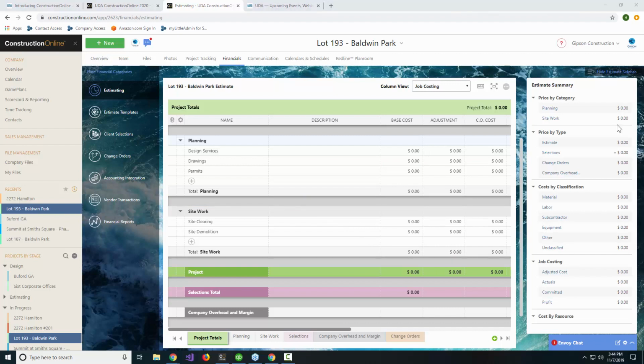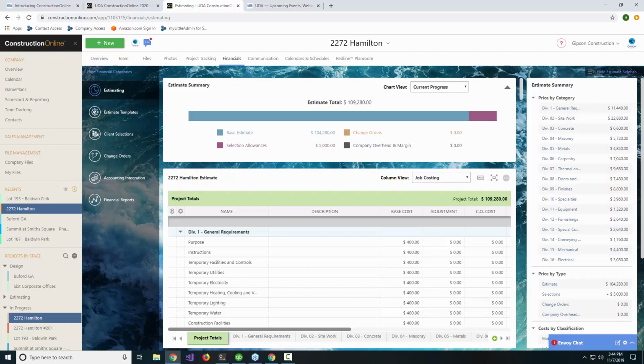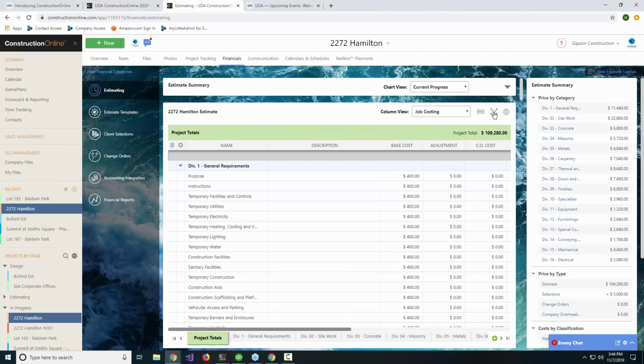And really that culminated in adding functionality for different tabs or sheets into the estimate itself. So those of you who are familiar with using our 2-level estimating system, the first page that you see is going to make a ton of sense. You're going to see top-level categories, which are really easily mapped to things like divisions if you're familiar using the CSI cost coding system of the 16 or 50 division breakdown in some cases.